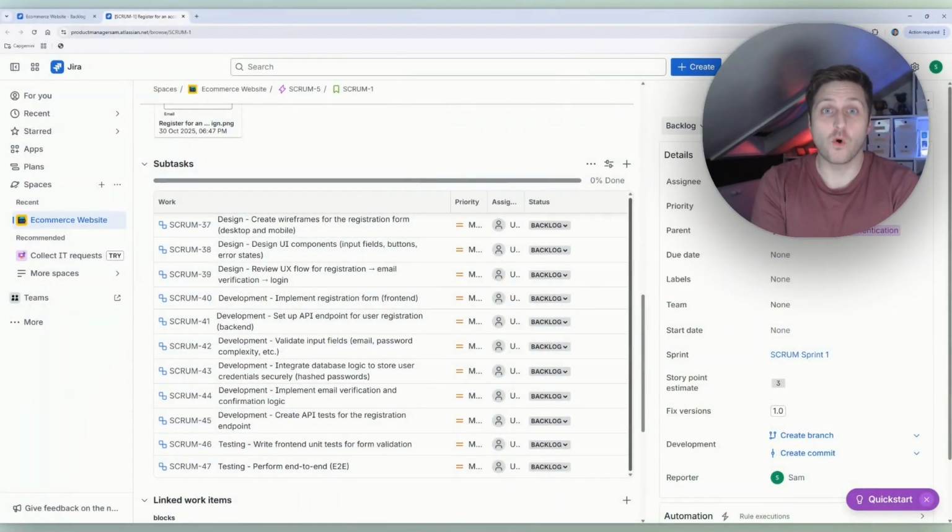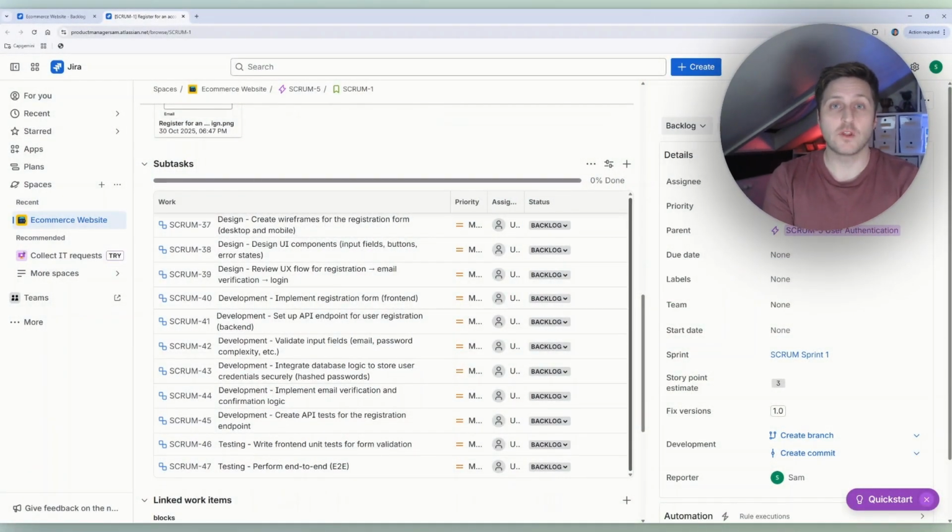There could be bits of research in here, for instance. But what this represents is, for a user story to be completed, it needs a cross-functional team to deliver it, but those individuals within the team might deliver different parts. So what I'm trying to get to in these subtasks is a level where you could assign each of these activities to an individual in your team.